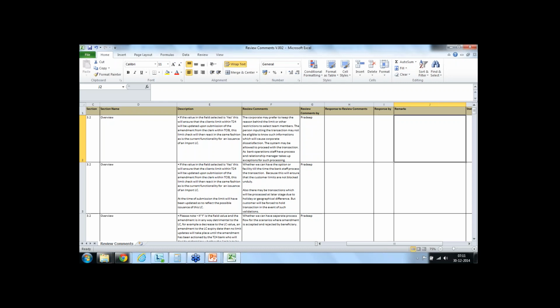It's a document where they will say what change they are making to the original requirement, what the impacts are, what the benefits are, and what it may impact in your project. For example, a change request may impact your delivery timelines, or in some cases, if it's an already existing system, it may involve changes to some of the existing components. So we need to provide analysis for any change request.